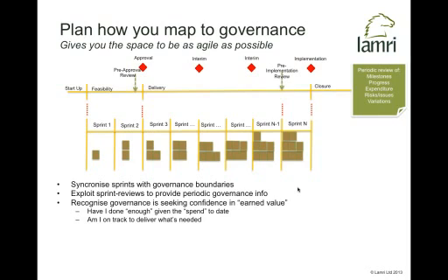And one of the nice things about Agile is, to a certain extent, it gives a fantastically crisp answer to that. Rather than saying I've got a lovely big design document and loads of source code written, but I haven't actually integrated or tested it yet, I can say we've got this set of features, they're built, they're thoroughly tested, they work, we've had user demonstrations, they're the right features, and we can deploy them because we put them onto a clean test box at the end of each sprint to thoroughly test. That's a massive demonstration of earned value of what we've actually delivered for the spend to date.